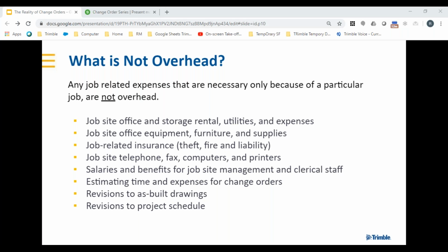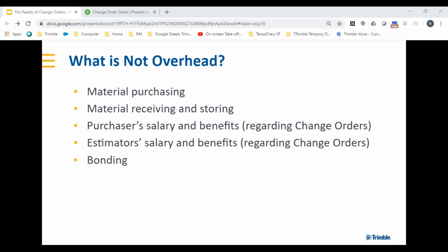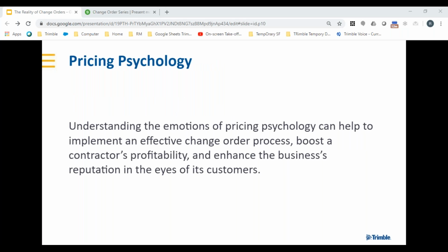Here's illustrations of that. You think office equipment would be overhead. It's not. Not if I don't need superintendents and project managers using that equipment, then it's not overhead. That's job cost. So define that. Where are we at? Time. All right. But these are not. All right.